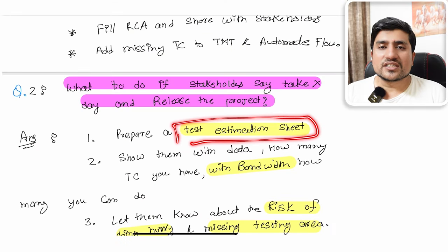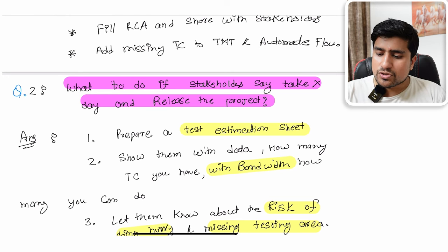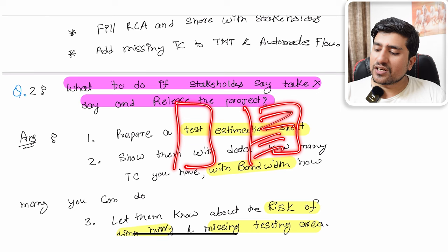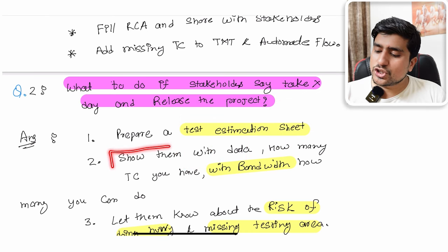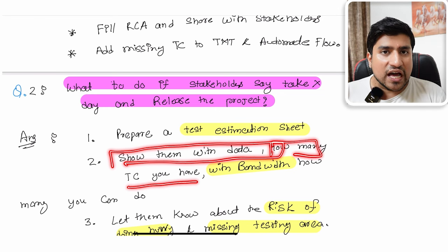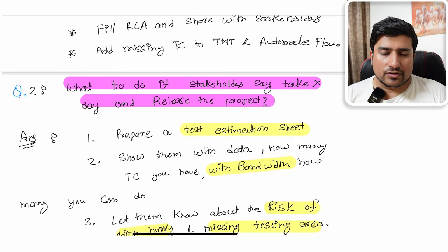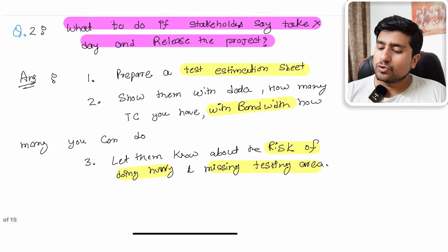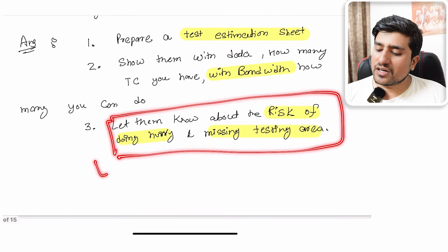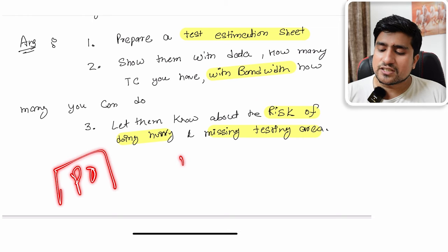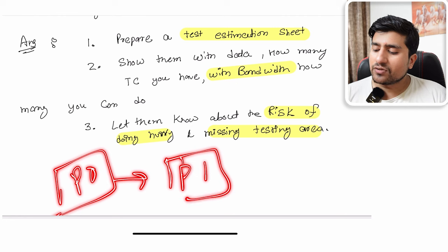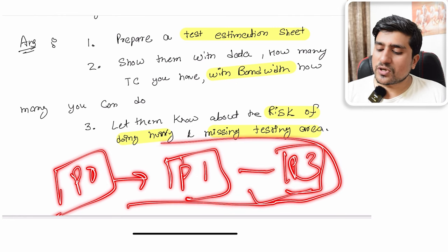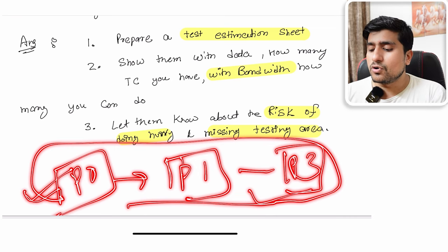If you haven't prepared a test plan, you can create columns in your estimation sheet listing the modules and the time each will take. Showcase with data how many test cases you have and what the bandwidth required is. Create a module-wise breakdown with the number of days or hours it will take to test. Present this to your module owners and let them know there is a risk involved. Make sure you are testing P0 scenarios first, then P1, then P3.